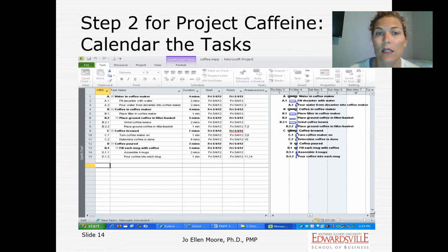One day is the shortest amount of time that you should be working in. You're not working in hours or minutes. It's days, okay? And some things are going to take more than a day. Some things, you're going to allow yourself a week to do.